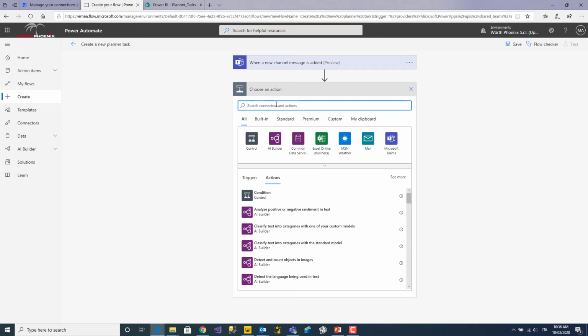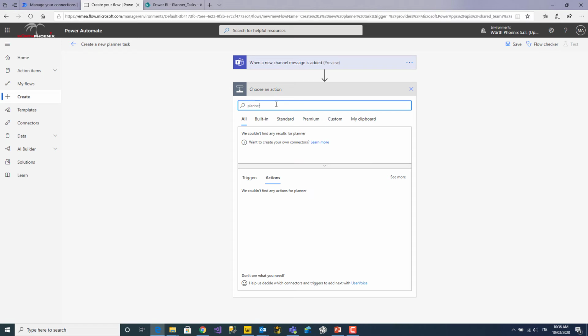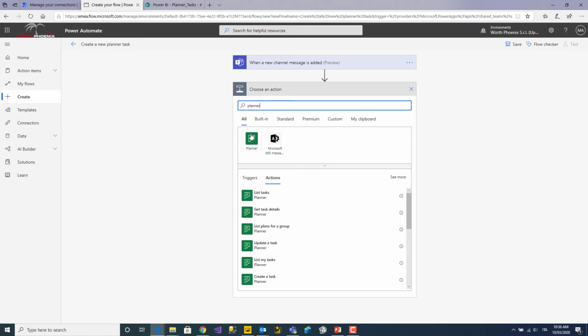Let's add a new step, and the new step is a Planner step. If I'm looking for Planner, see, I have a lot of actions available for Planner. What I want to do in this case is create a new task. So every time a new channel message is added, please, in Planner, create a new task.